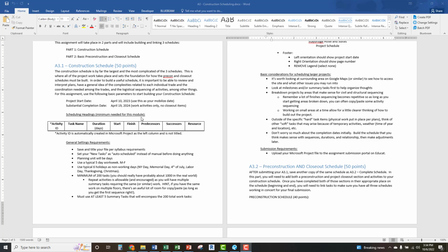And that'll help you start sparking ideas of where do we think my durations are incorrect, my relationships are incorrect. There's a lot of different things like that. And more often than not, in my history, I've ended up with overshooting that substantial completion date and then coming back to readjust a lot of the relationships to start adding lag times and stuff like that.